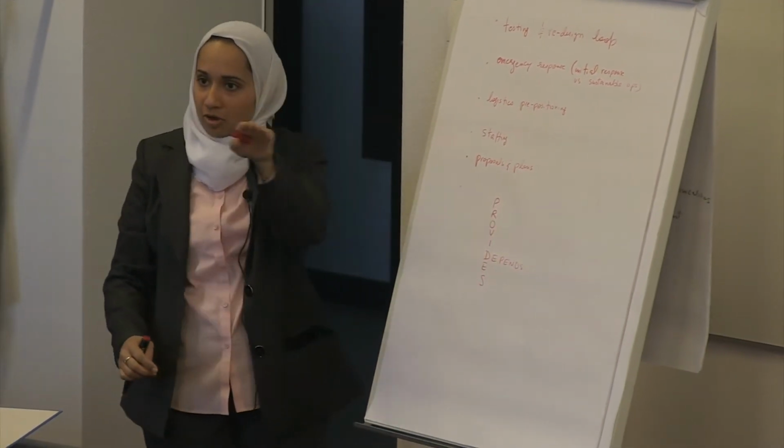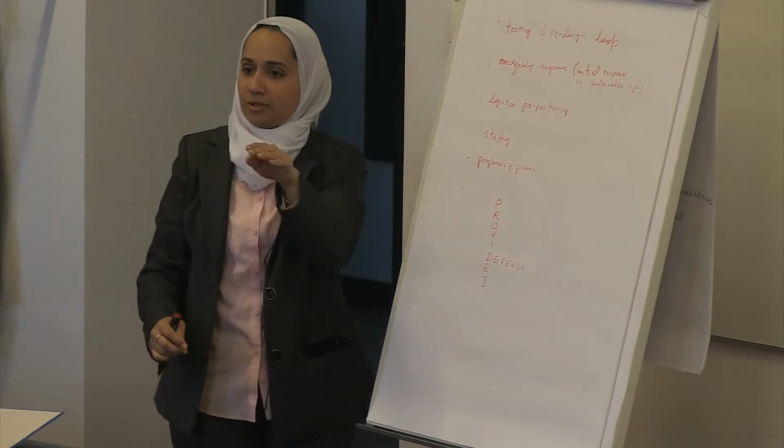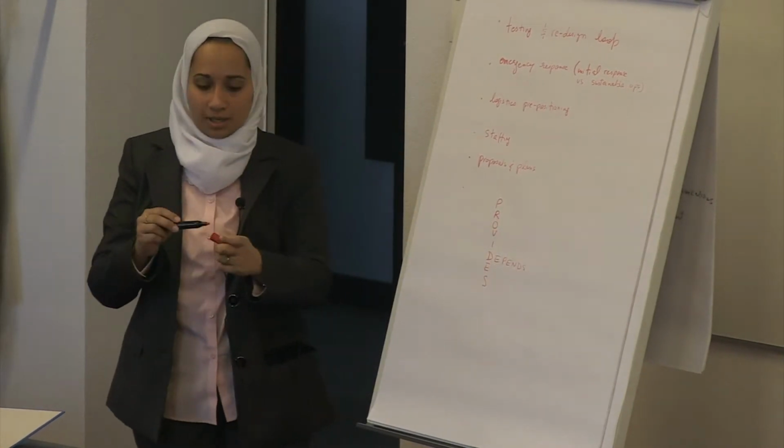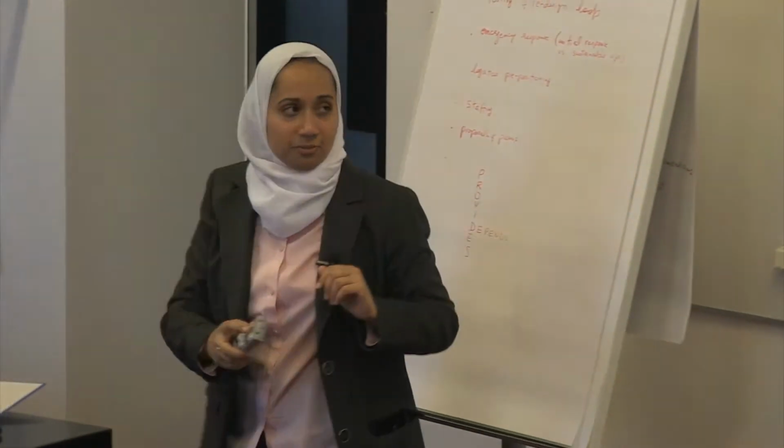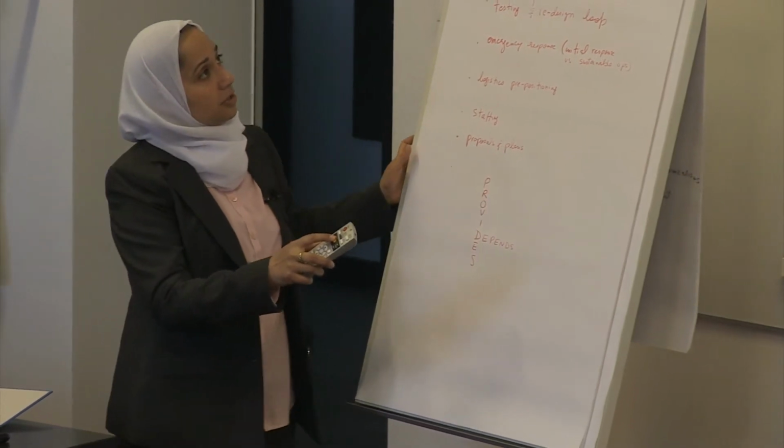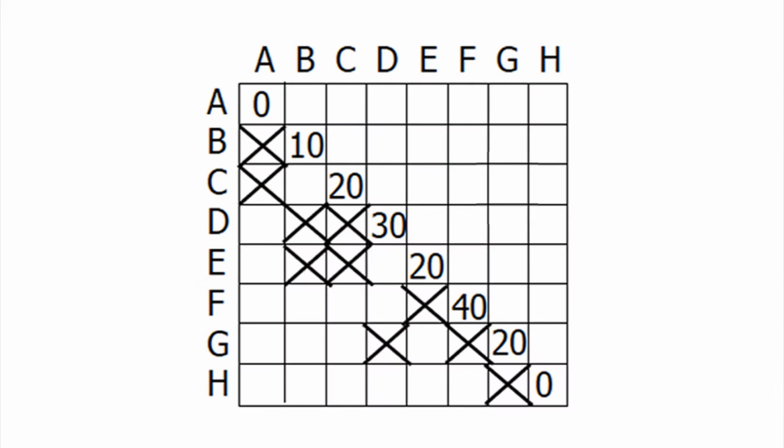And if you look across the row, you'll see what an element is receiving from, okay? Because if you recall, the arrows are unidirectional, so we need to be careful about directionality here. So here we can say that A provides to B and C, or it's feeding into B and C. And if we look across the row for B, we can see that B depends on A.